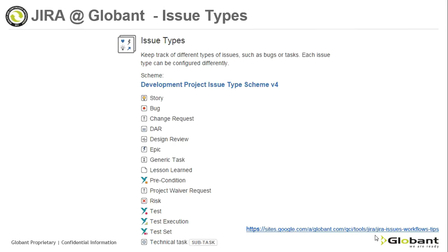This issue type should be submitted by the technical lead, attaching all the architecture documentation required for the review, and will be reviewed by a special group that includes most of the technical directors. Epic. Epic issue type is used when a story includes too many uncertainties to tell just how big it is, or when the story's requirements are known, but the effort to complete it in a single sprint is too huge.